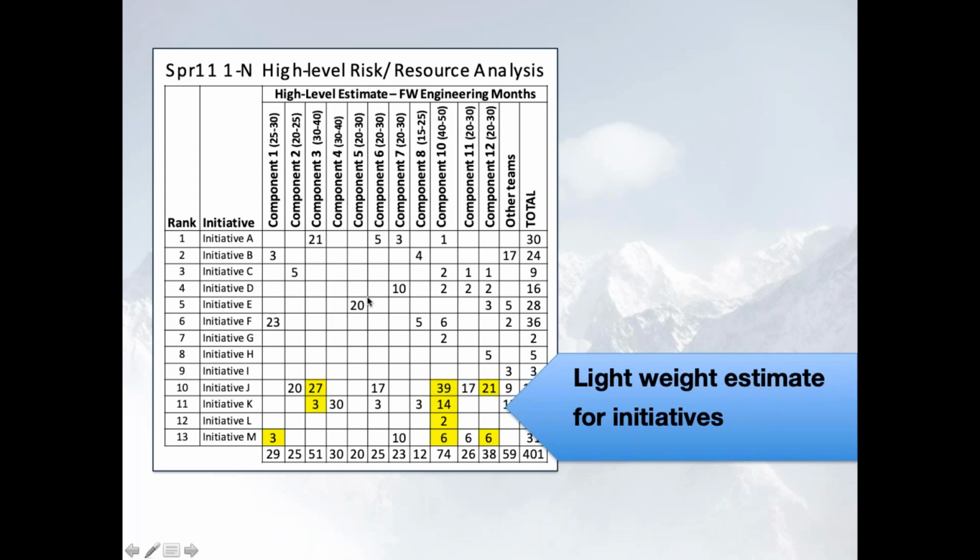And we walked through this, and you could really quickly realize that initiatives A through G are probably going to happen. Don't worry about those. Don't worry about trying to prioritize C versus D, because it doesn't really matter. Both of them are going to happen. If you're thinking about initiatives L and M, start the grieving process. This isn't going to happen. It's not going to come together. If you're in here between H and K, it may or may not happen depending on how the development goes.